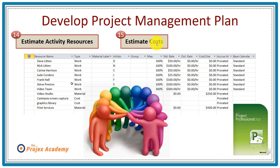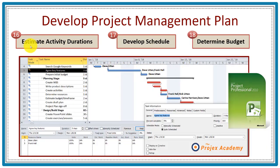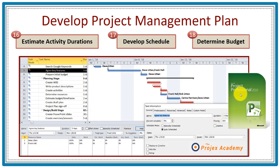Step fifteen is estimate the costs. You would consider each activity and estimate the work effort involved, plus any tools and equipment, to come up with the total cost — done by assigning the relevant resources within Microsoft Project to each activity. Step sixteen is estimate activity durations. What is often misunderstood is that you don't simply look at a task and estimate its duration — that would be a guess. Instead, you assign the work effort and those available to carry it out, and Microsoft Project will automatically calculate the start and finish dates.